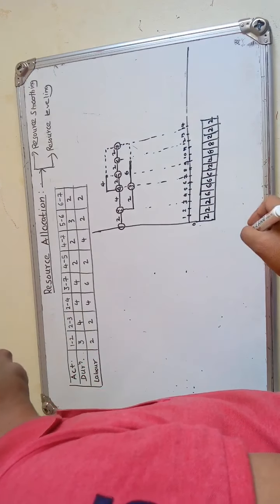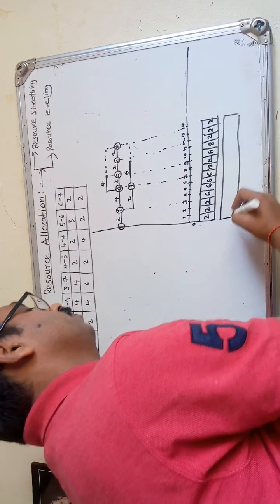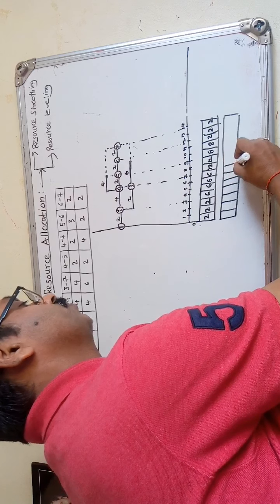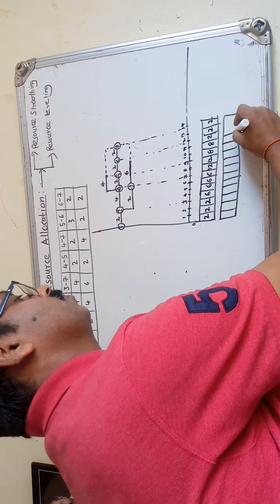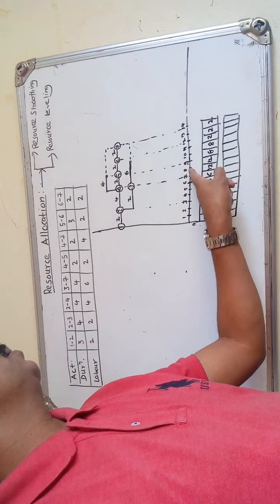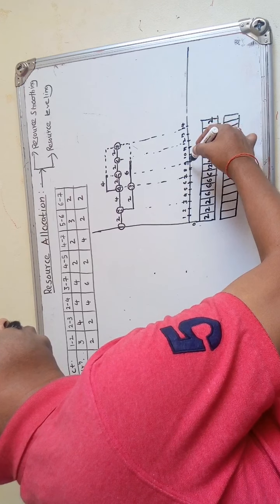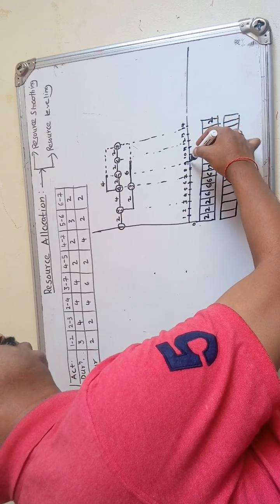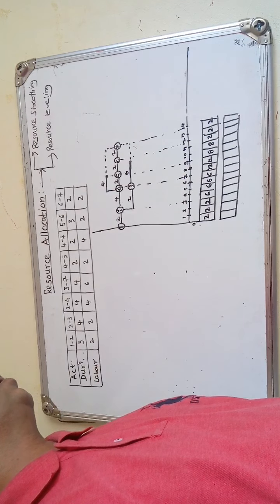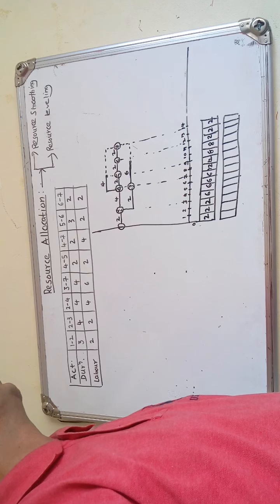After smoothing, we have to find out the labor requirement every day. So if you see the demand between this particular 7th to this particular 9th, means on the 8th day and 9th day we have 12. Can we reduce that particular 12 labors? For that we have to see the start and end of the non-critical activities.